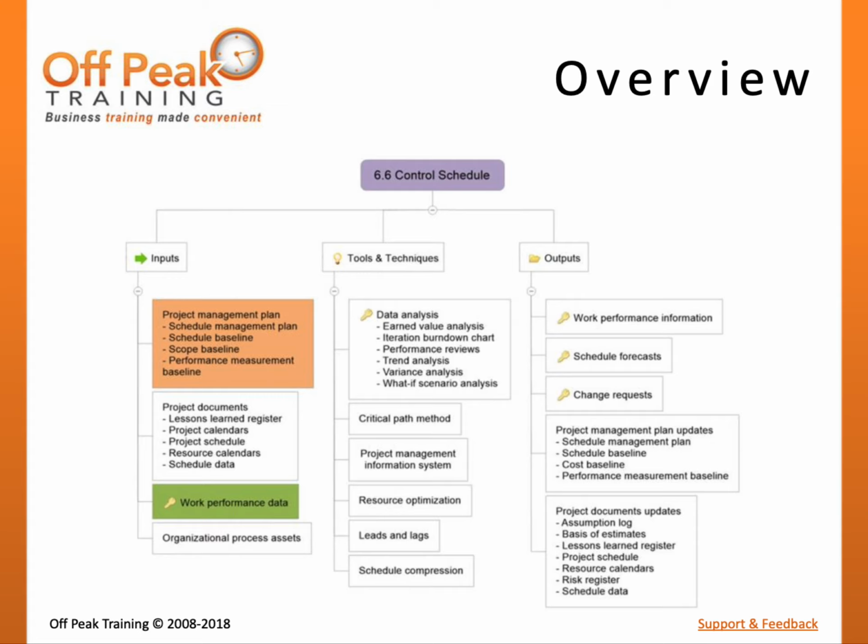One popular technique is earned value technique. In this process, the project management team observes the completion of project work as compared to the approved plan to determine performance. When a variance exists, corrective and preventative change requests should be generated to help bring future results closer in line with approved plans. The tools and techniques listed in this process are all similar to the variance analysis technique used in control scope.